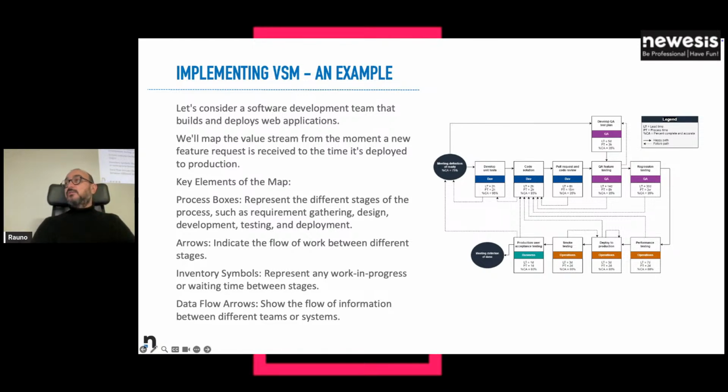And then we could invest in the regression testing, where we have a high percentage of failure with also very long lead time. So we could invest in some automation there in order to reduce the time. But we can also invest in an automation that anticipates the tests during the coding phase, so that the percentage of failure during that phase will go down.